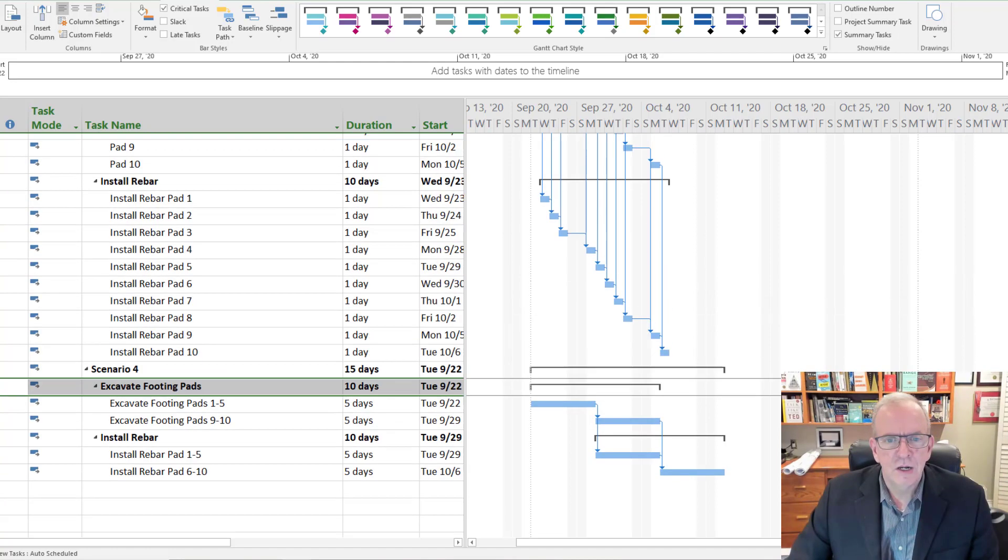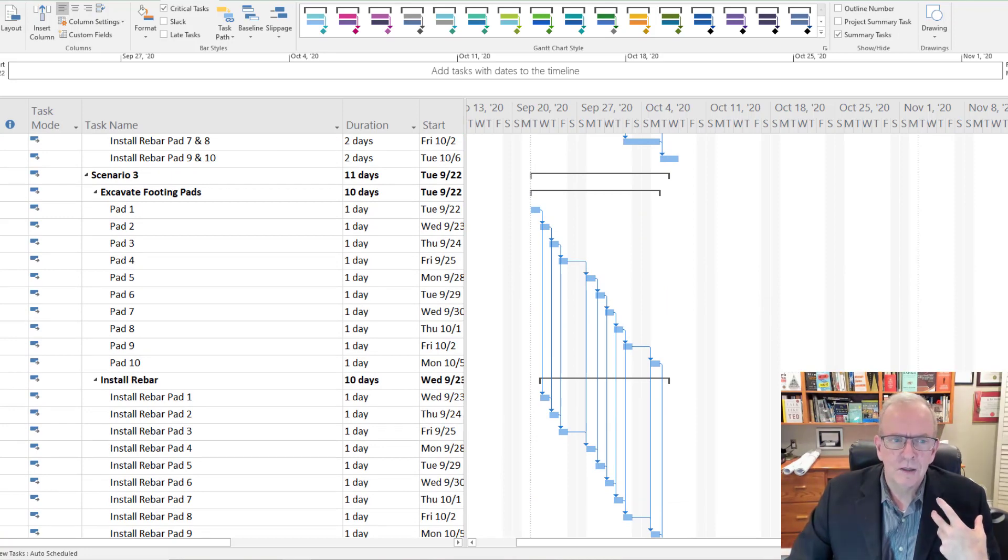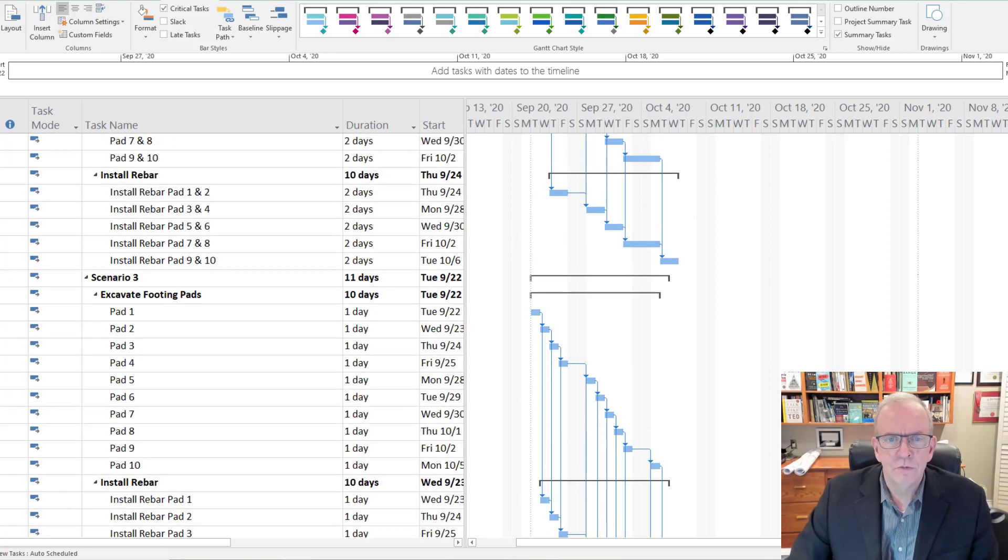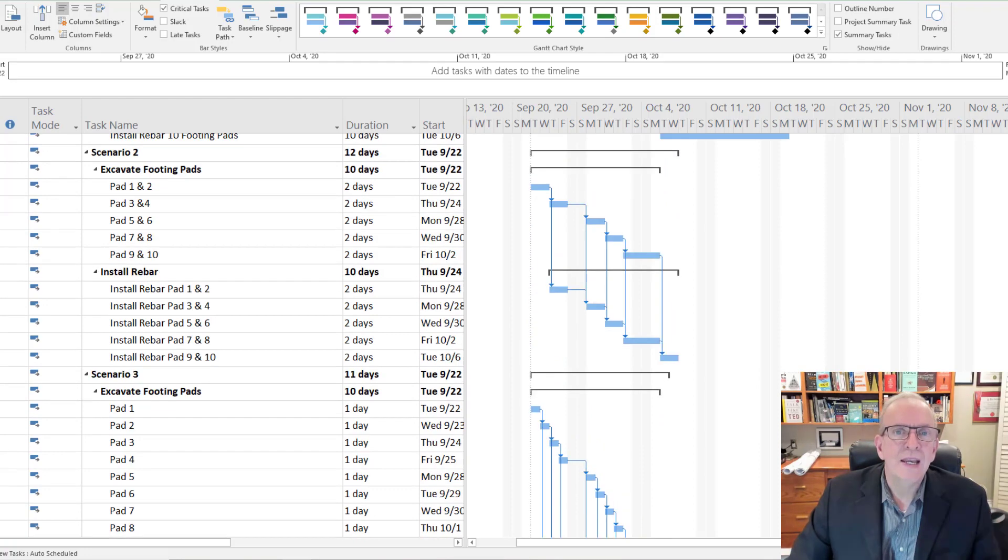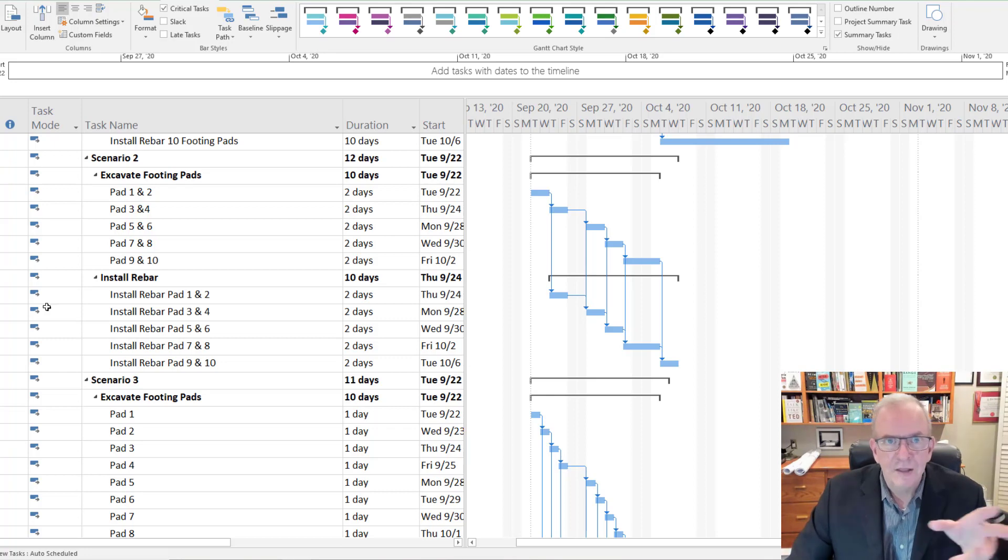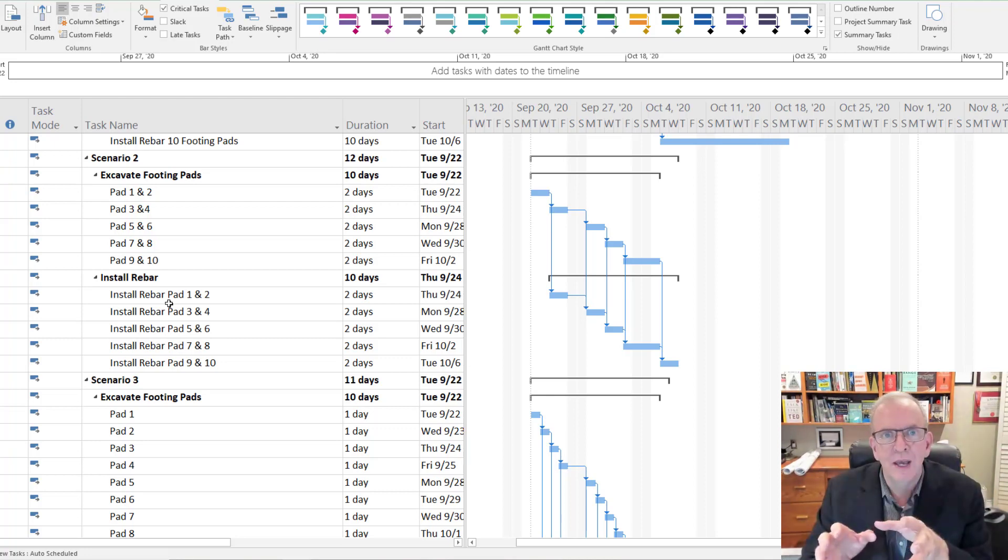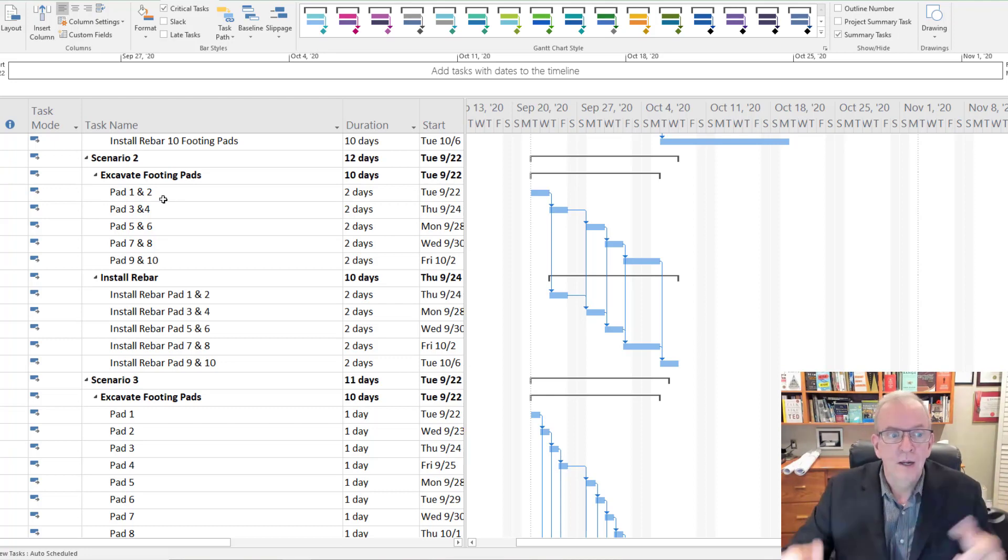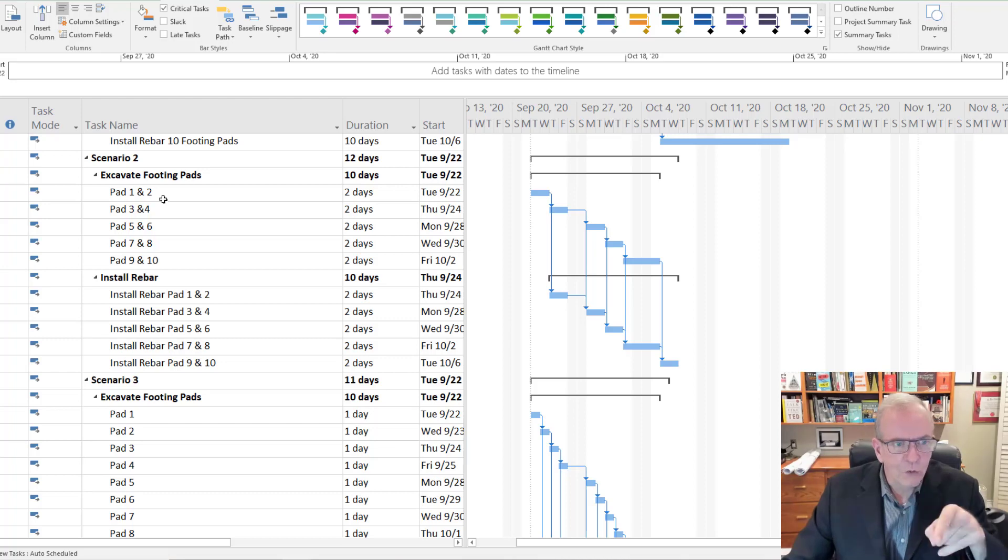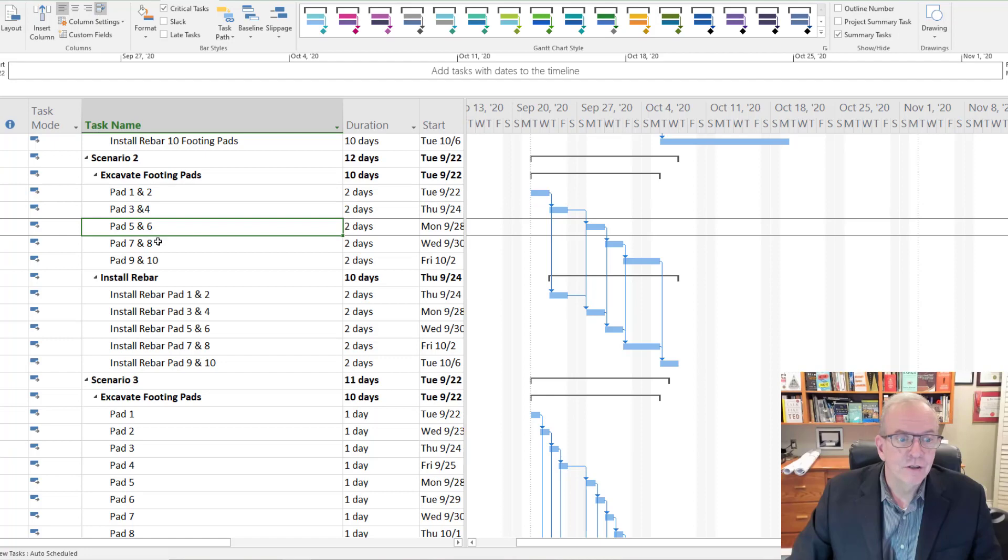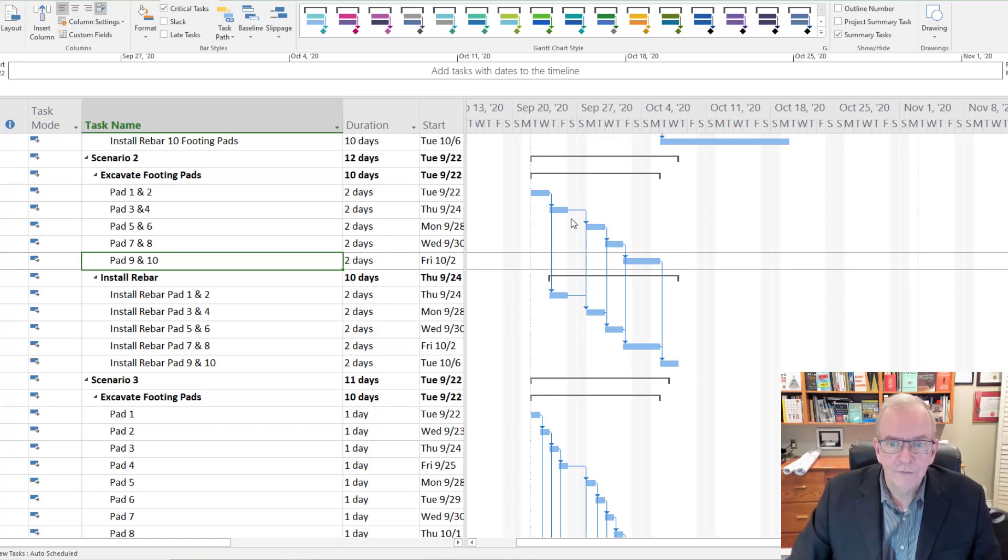Usually you're looking at things, how you want to get a nice steady rhythm, and you try to chunk things into those sizes. What's really being talked about a lot now is what we call tack time. Tack time is all about zones and creating that rhythm. So you create a zone and you do the work in that zone and you make sure you complete what it is that you wanted to complete in that zone before it moves on to the next zone. In this case, we're creating a zone that if I had a floor plan here, I could take a highlighter and I could create those zones.